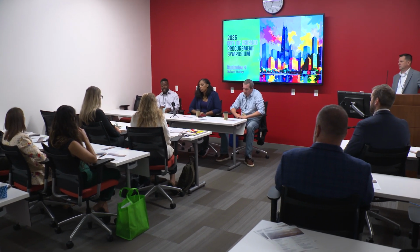Yeah, I don't think that it's fair to say the plans aren't developed. They're just typically at an earlier milestone, like a 60% design development or 75% progress. And for most trade packages, that's adequate for us as CMARs to identify the lowest, most responsive bidder. And then from there, if there are subsequent changes to the design, we have the benefit of having the trade partner on board to get some of that feedback from you as trade partners and deliver a more constructible design to our customer. I hope that answered your question.